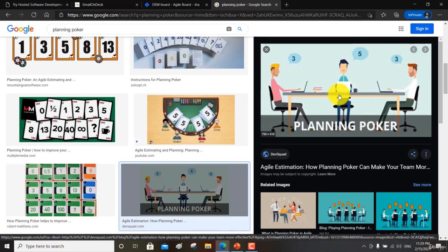We have the product owner, the Scrum Master, the developer, the tester, all of them gather together at the beginning of the sprint, at the sprint planning meeting. They begin to read the user story with its acceptance criteria and its risks, and each one of them separately chooses a number. This number represents the complexity of this user story and the time that it will require to be implemented. If they all agree on the same number, then this is the estimate of this user story. If they don't agree, in this case, each one of them begins to explain his point of view and they try to reach a number that all of them accept.